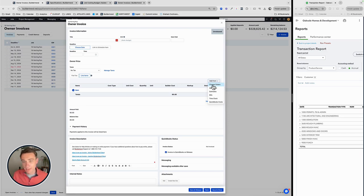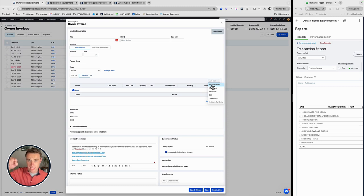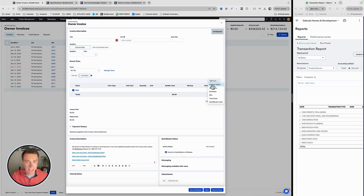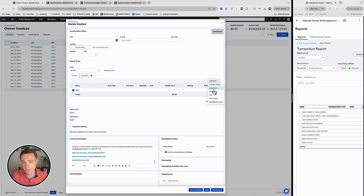If you're doing a change order once it's approved, you're typically going to take that change order and immediately create an invoice. And that's going to automatically take care of that. So that should already be handled.